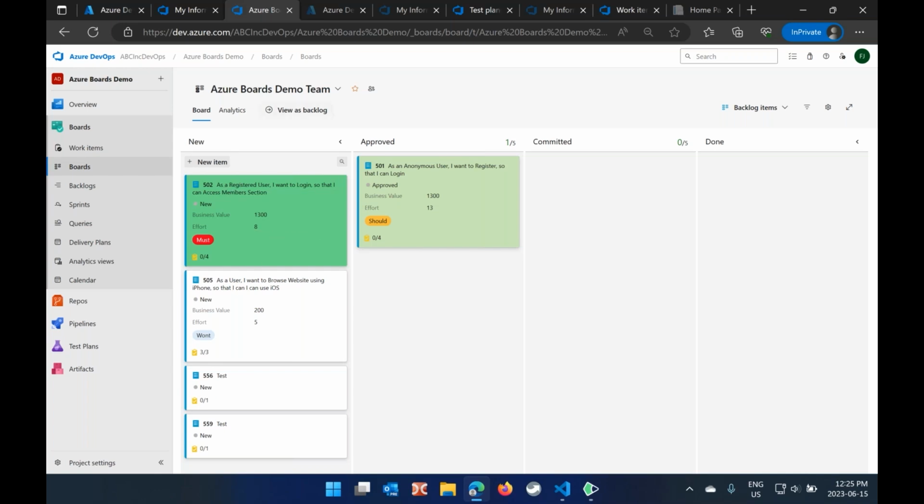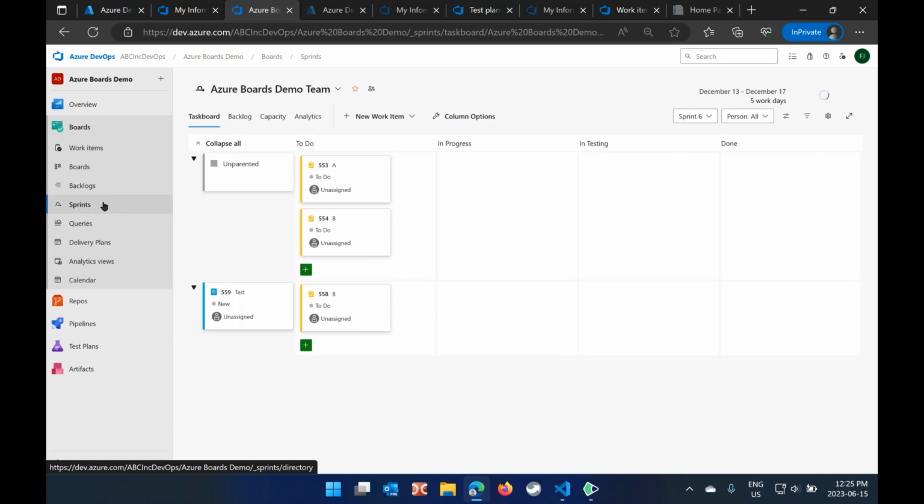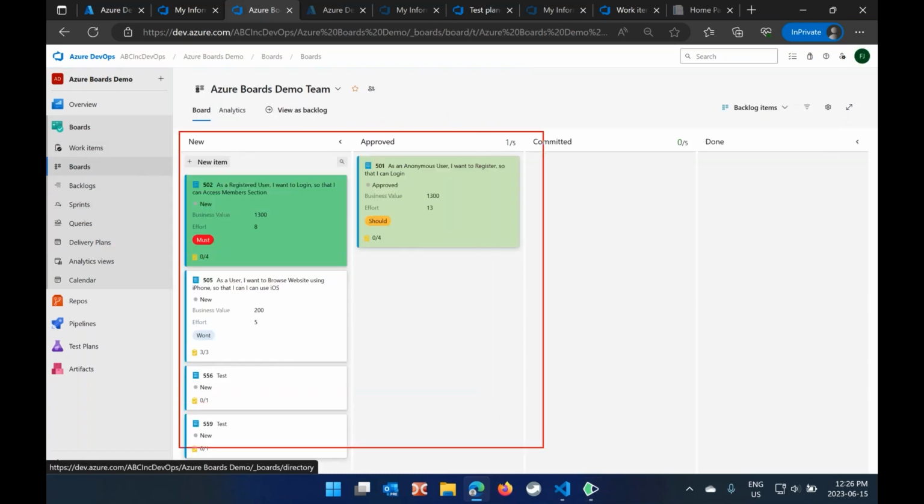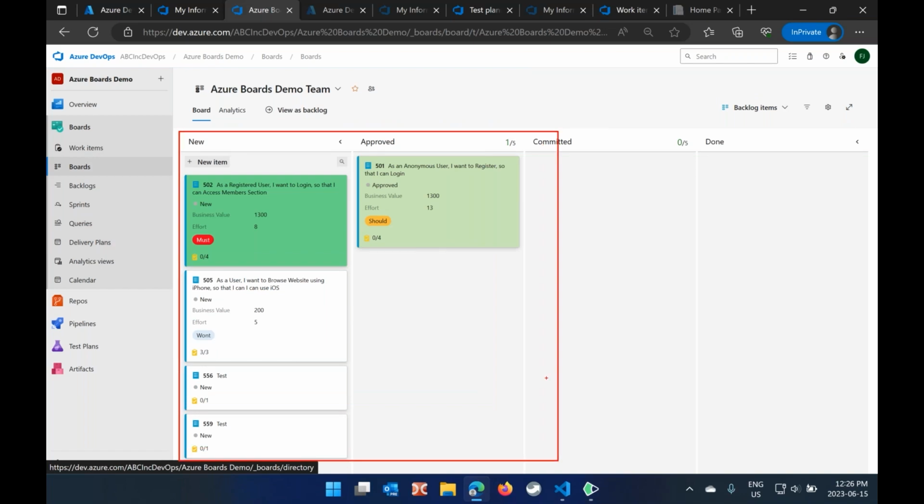And once we have the backlog in place, which would mean it's sort of your wish list, your customers are saying that we need these things in our application. So once this is done, next you will end up working on the sprint backlog. Your overall product backlog is the overall wish list. It could contain literally hundreds or thousands of items. But we need to work on it in sort of a piecemeal manner.